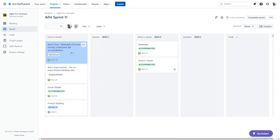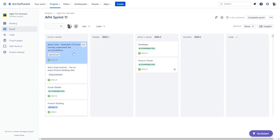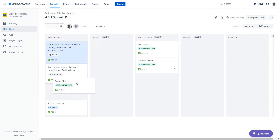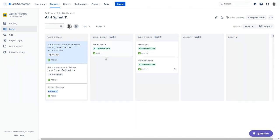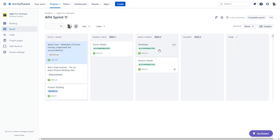Right now we have a product backlog item that sits in the To Do column, and we also have our retrospective improvement item. As a team of developers working together trying to accomplish this sprint goal, we come in here and look at this custom workflow. We see an opportunity to maybe pull some work — our sprint goal says 'attendees of Scrum training understand the accountabilities,' so we can look down and say we have an opportunity to pull something here that relates to the accountabilities, which relates to our sprint goal. We may start this in our Design column. We also look at these other product backlog items we're working on in the sprint and talk about the progress of them. The opportunity here is to inspect progress towards the sprint goal and adapt a plan for the next 24 hours.